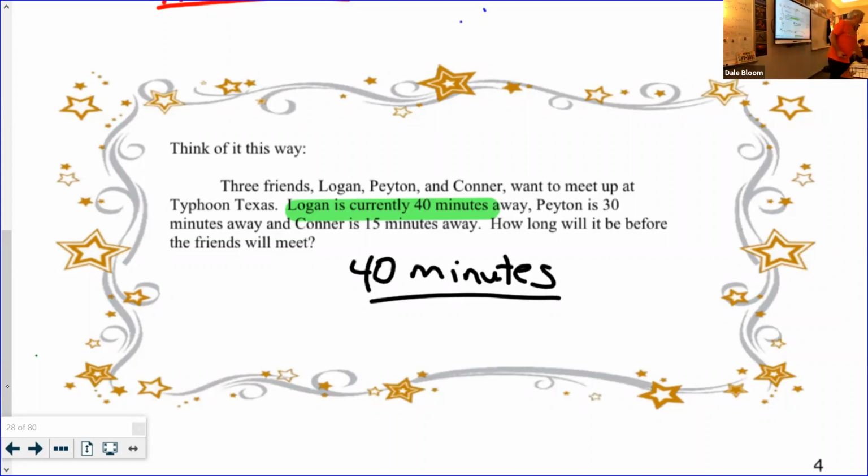Okay, on the back of your handout, there are 3 examples. The first example is giving you a diagraph, and it's telling you how many paths there are through there. What that first question, how many paths are through that diagraph? It says there are 4. So you guys write down your 4 paths. You guys write down the completion times of each path, and you guys figure out your critical path. And then you figure out your earliest possible completion time. Remember, your earliest possible completion time is the shortest path. The minimum possible completion time is that project critical path time. Okay? I know this is confusing, but we're going to hit this.